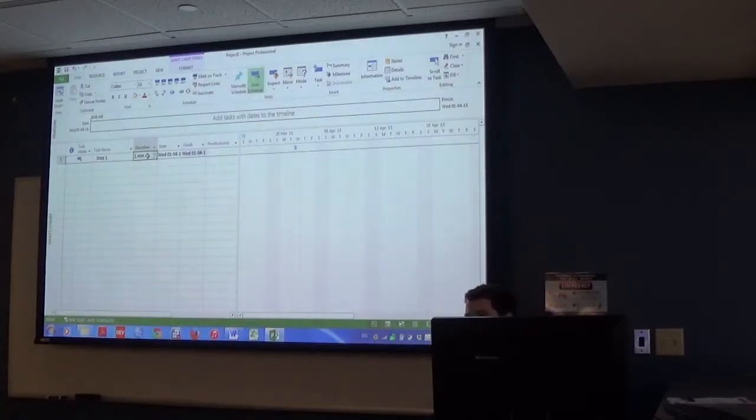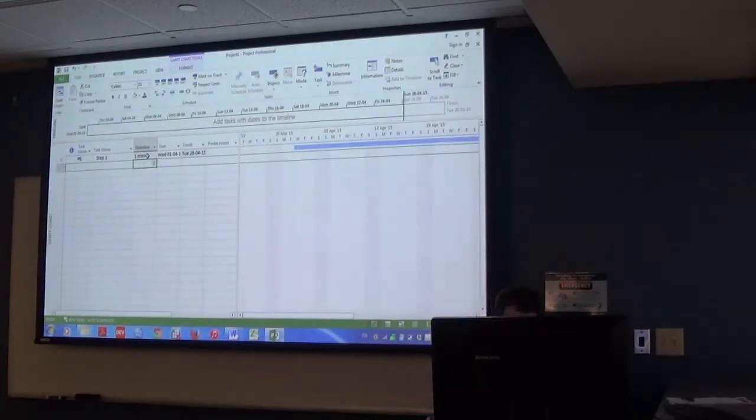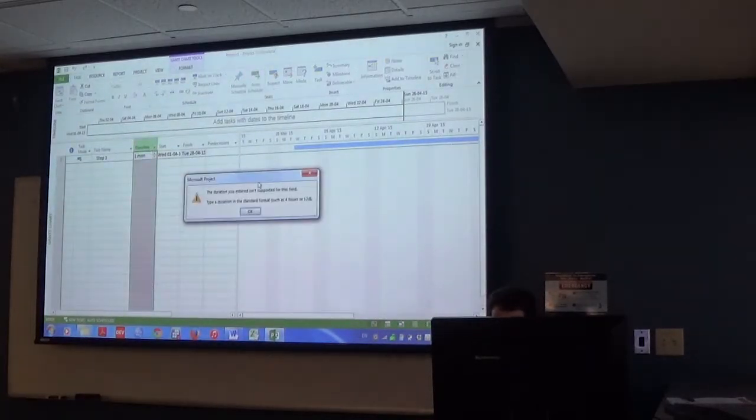Did you see that if you type in 1M, that would be 1 minute. If you type in 1D, that would be 1 day. 1H, let's see what 1H is. 1 hour, there we go. Let's try, what do you think month is? MO? 1 month. Okay, 1 month, there we go. There's 1 year.